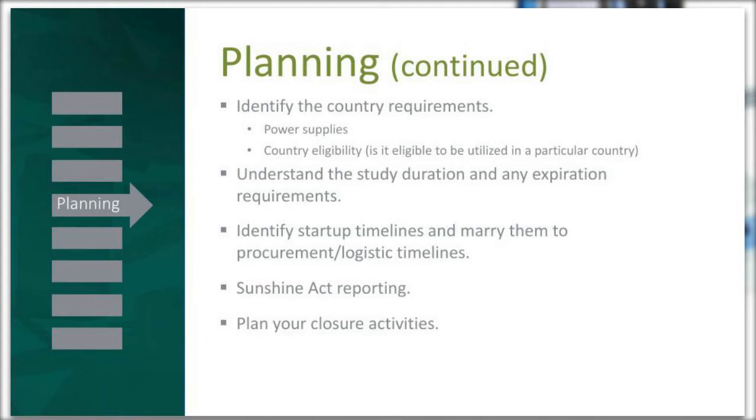And Dan is going to talk about logistics in depth here in a few minutes. But that timeline can really vary depending on the country and the type of equipment or supplies you're getting into the country. So understanding what those requirements are during the planning phase will really help you ensure that you're buying smart, so that you're maximizing the utilization of those products and not wasting money and causing delays, as Dustin mentioned, by maybe not having the right supplies when you need them, or finding out later that your supplies have expired and you have to start again.